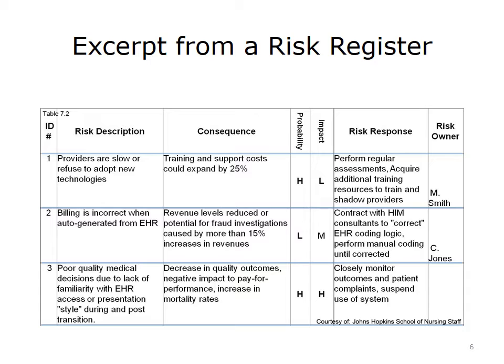You may not be able to complete all of the columns at first. For example, you may have several possible responses to a specific risk, so you might list these in that column for a time. As you continue to analyze the risk, some options will be eliminated and you will eventually zero in on the best strategy. The risk register becomes a place to keep track of and update information as it becomes available. Probability and impact are assessed as high, medium, or low, and you will use these rankings later in your analyses.